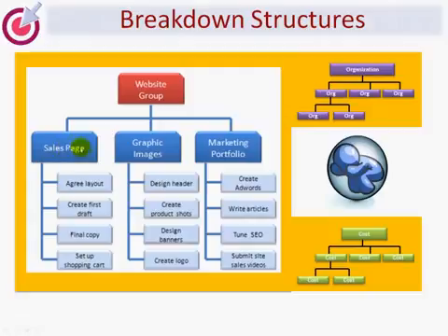So this is a high level, and we'd split this down further to the packages of work, the activities, if you will, to create all of the products that are needed as part of the sales page. And it's called a breakdown structure because it's a hierarchy, and the human brain quite likes the way that this is created. You'll find that if you put your team in a room, perhaps using post-it notes, you can generate this type of layout quite quickly.